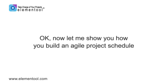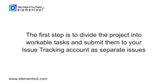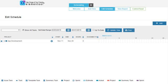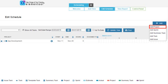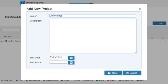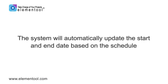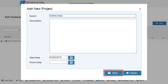Now let me show you how you build an Agile project schedule. The first step is to divide the project into workable tasks and submit them to your issue tracking account as separate issues. Then go to Scheduling and click on Edit Schedule to build the project schedule. Click on the Add button and choose the project option. Type the project name. The project's description and start and end date are optional. The system will automatically update the start and end date based on the schedule. Click Save.